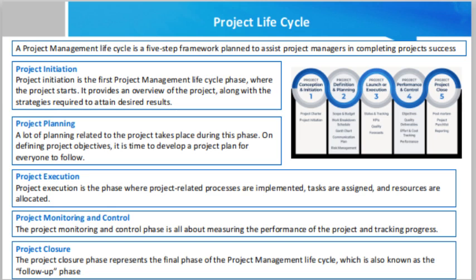It is essential to go into minute details to have a better understanding of the project. Upon making a final decision to proceed, the project can move on to the next step, that is assembling a project team. The project charter is considered to be the most important document of any project as it comprises business vision and mission, project goals and benefits, a list of stakeholders, a scope of the project, project deliverables, risk associated with the project, project budget and resources.